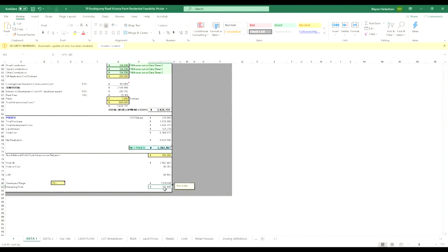You'd have this extra bit of money here. You've got a safety window, if you like. Okay, 971,000. You nearly got $1 million extra there as a safety net, and still get 25%. Whereas, that's the advantage of having something that's starting at 40% like this, because you've got some contingency.